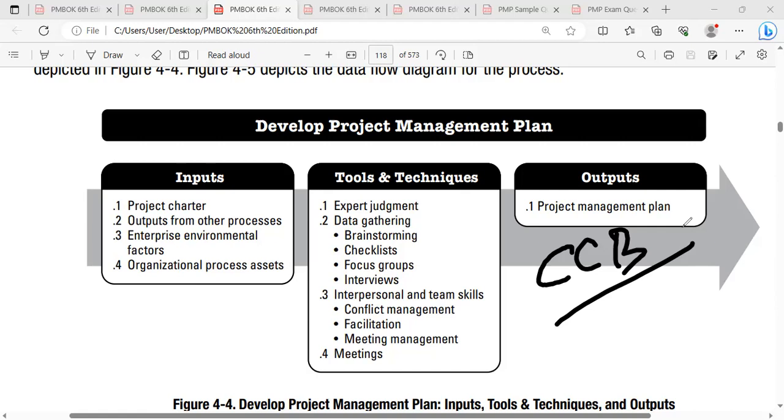So if any changes, scope related changes, cost related changes, resource related changes, regulation related changes, internal changes, external changes are coming from anywhere, from any parties, there is a separate entity to receive your changes. They will review your changes, and they are the final authority, the decision maker whether to give the approval or the rejection.